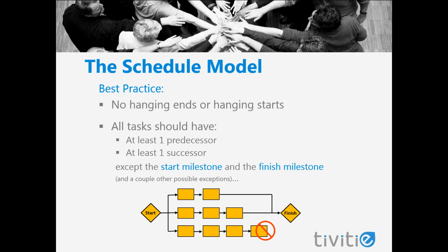If I use that schedule model and I can see that 6 months from now in June, I have 4 weeks where I have enough tasks scheduled that I need 6 technicians to be working on my project, but I only have 3 technicians that have been assigned. Because I know this so far in advance, I may be able to acquire more technicians from the resource owner, or maybe I can subcontract some work out, or if it's an ongoing need, maybe we just hire more technicians.